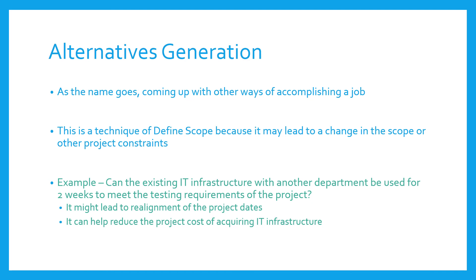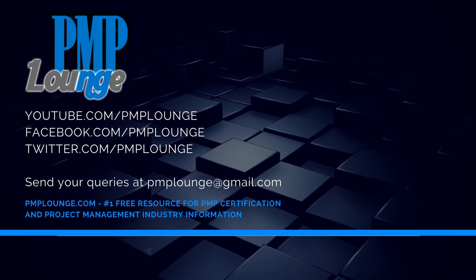In the original project scope you might have included the cost of setting up iOS and macOS environments. But when you apply alternatives generation, you may find you can use an existing environment from another department, reducing project cost. This could also lead to a realignment of project dates based on when the other department can provide the infrastructure. Those were the three tools and techniques of the Define Scope process. Subscribe to this YouTube channel, check us out on Facebook and Twitter at pmplounge, and visit pmplounge.com — your number one free resource for PMP certification and project management information.